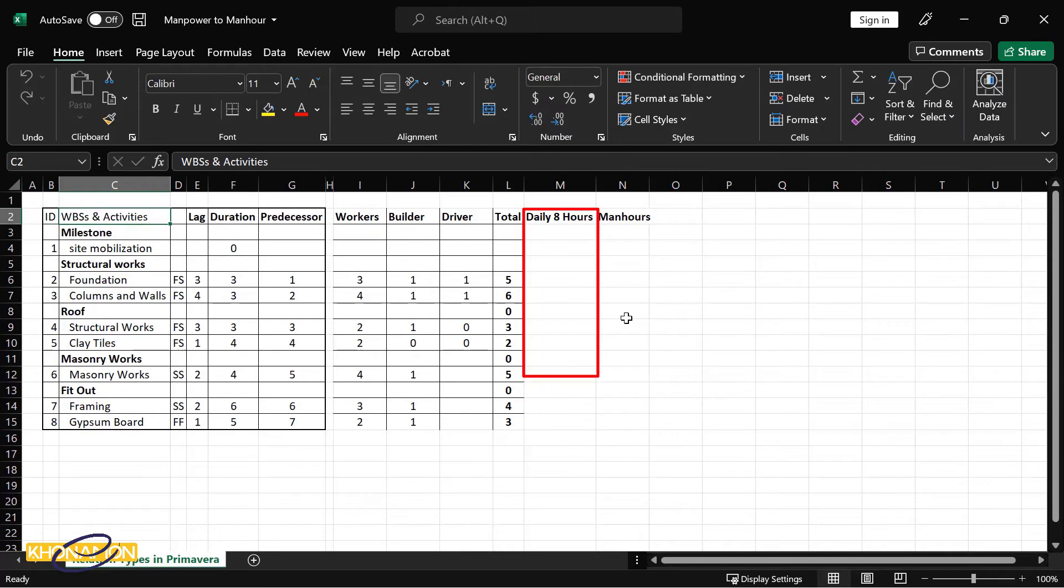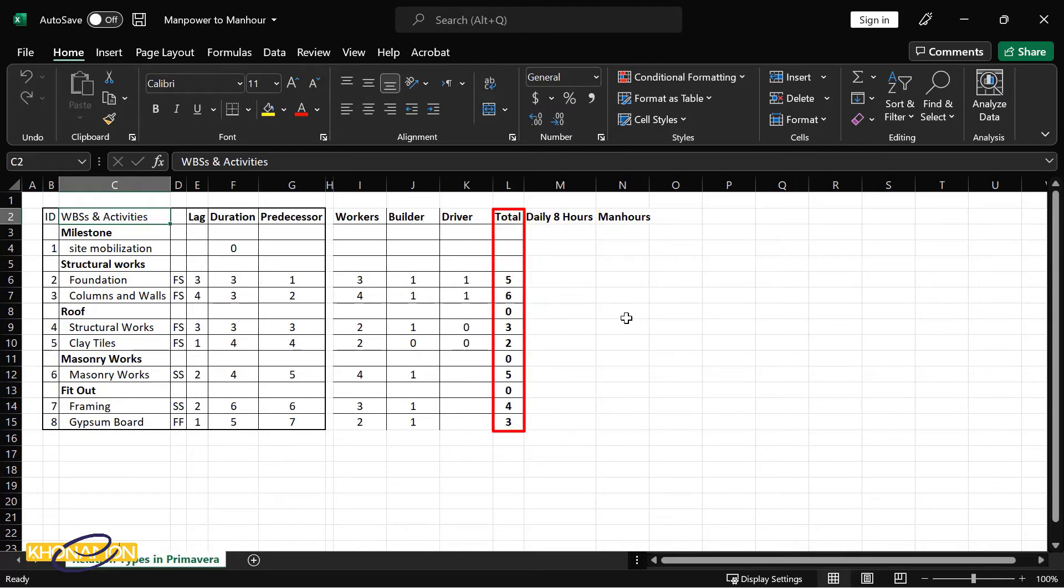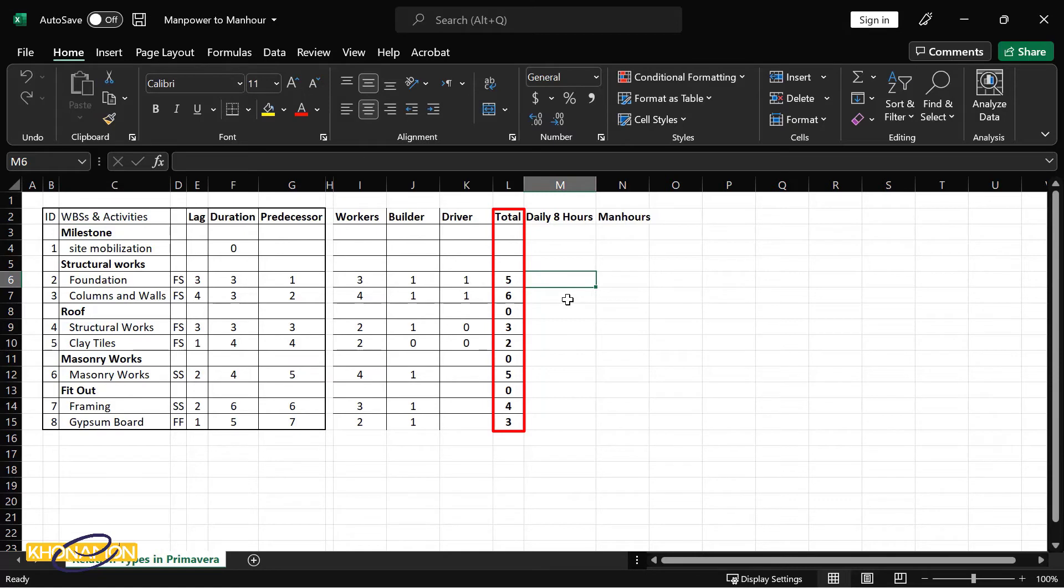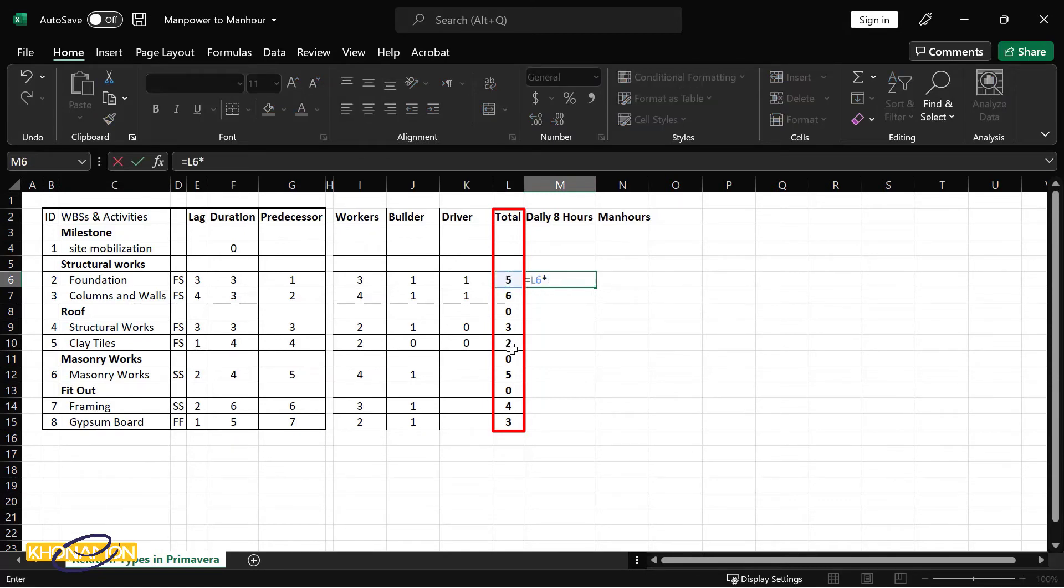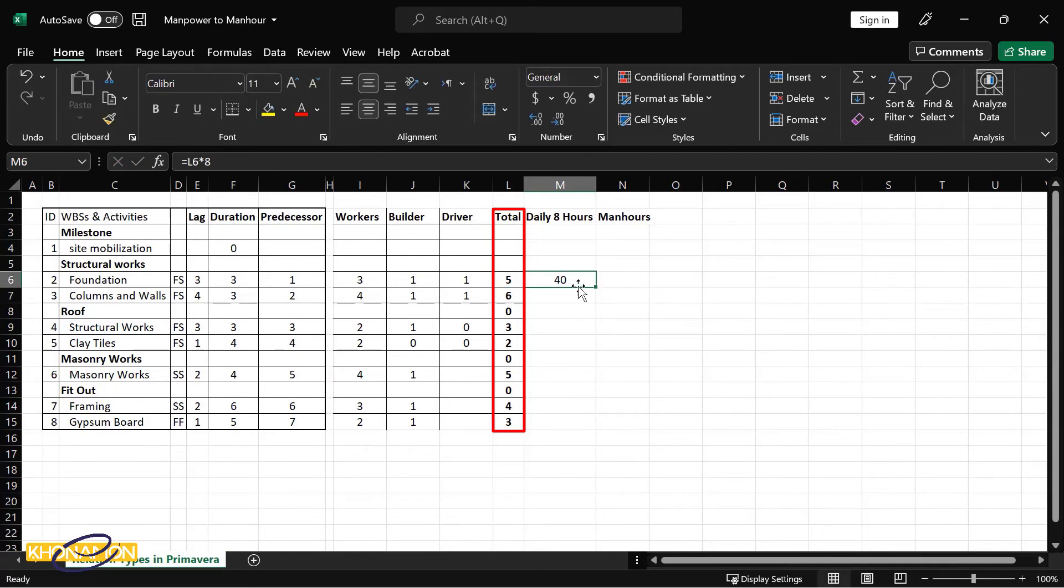Here we're supposed to work eight hours in a day, and we have the total direct manpower here. So simply, if I multiply the total manpower with the daily hours, I get manhour of one day for one activity.